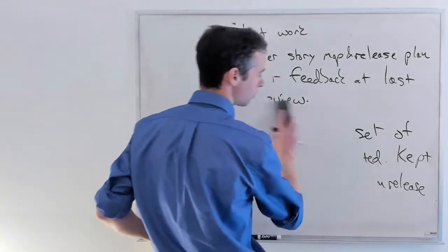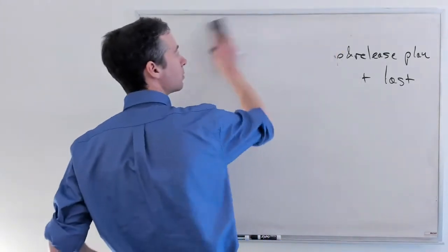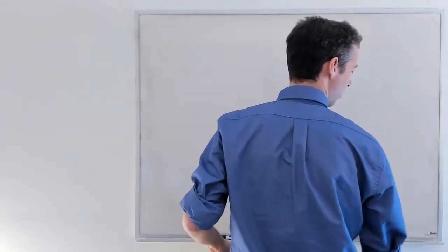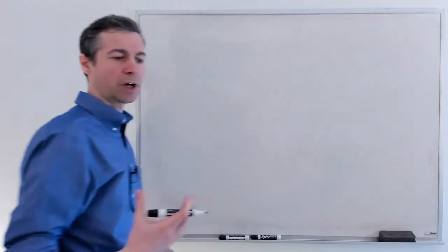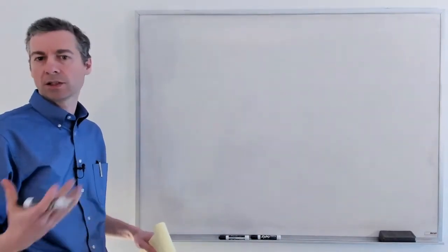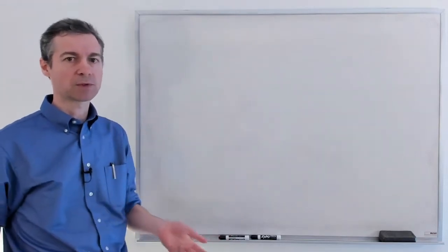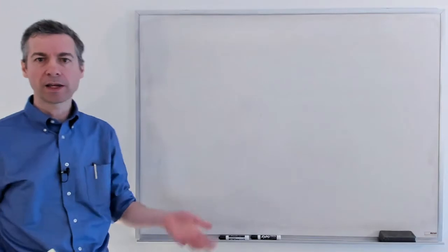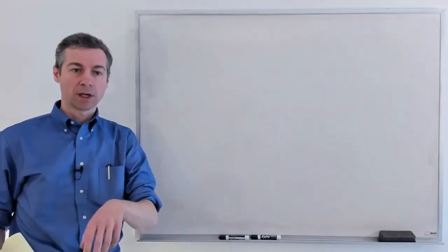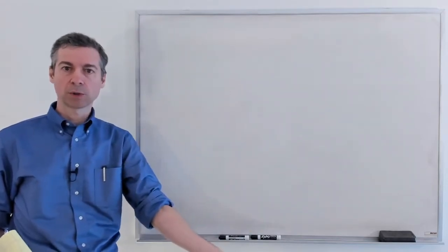We always use the priority ordering to control what it is that we're going to work on and not waste our time doing work on features that might not turn out to be important to the user. Once we have a sprint review, it's very possible that the client says, oh, I want this now, and what they wanted before is no longer important.